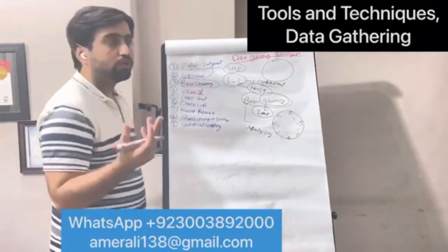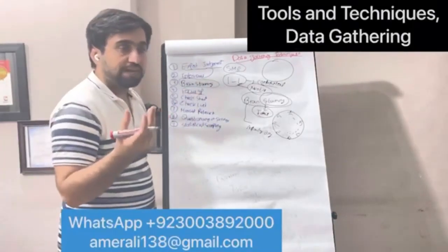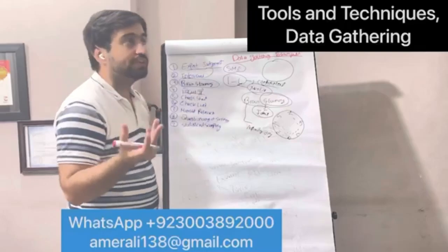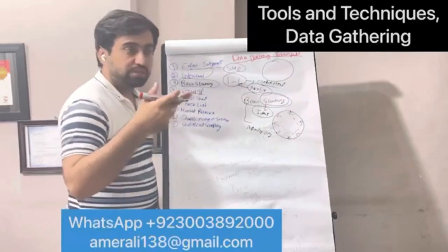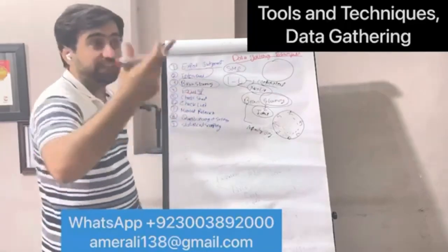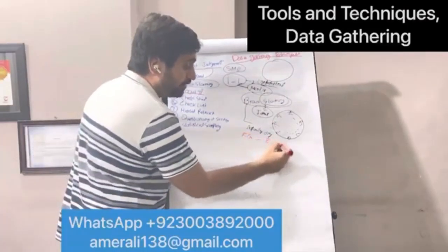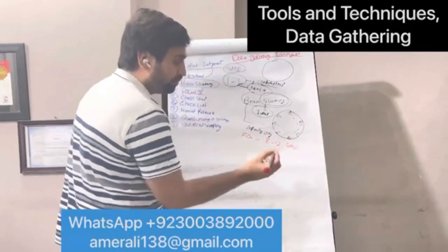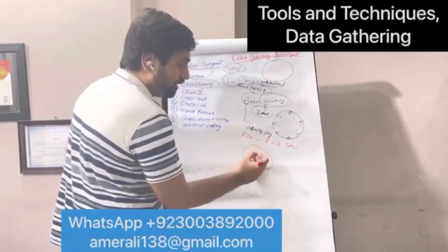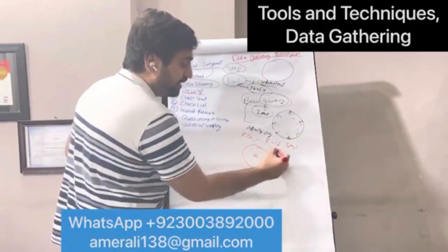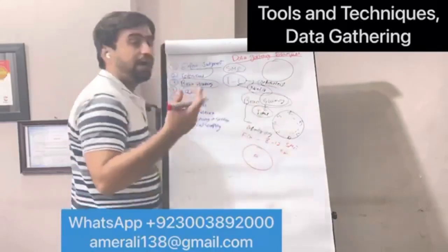Now, focus group. Focus group is also a very special type of idea generation technique, or you can say an interview technique. That is a variation. In a focus group, 8 to 12 subject matter experts sit together, led by a facilitator. It is time-boxed and ideas are generated.